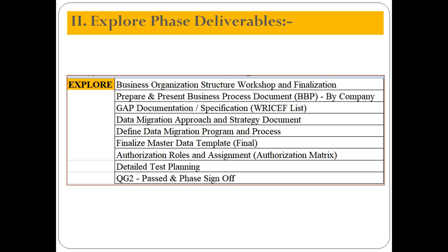Then we are going to discuss the final master data template. Okay, why do we have to finalize the final master data template? Because during the explore phase you have to share the template with the customer, because the customer will prepare the data, download it, and then send it. Maybe this will take a month's time. If you give the template, they will not give you the data the next day. So this will take a month's time.